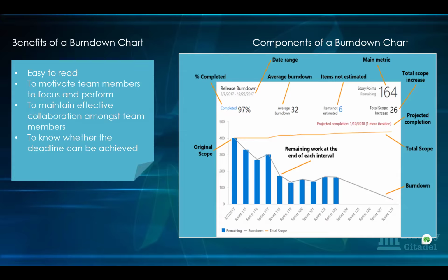So also, if it had been a sprint, it would have given a projection to say, oh, at the rate at which you're going, at the end of that day you will need 20 something more days or 3 more days. And that's what you want to show your team members, so that it helps them to focus. You're not trying to pressure them, because we don't want them to rush and make mistakes. But at the same time, peradventure they've not been focused, they're distracted, that helps motivate them to be focused and get back to what needs to be done.